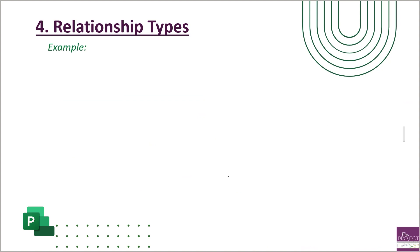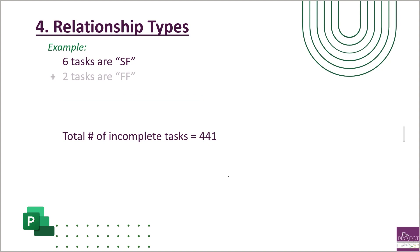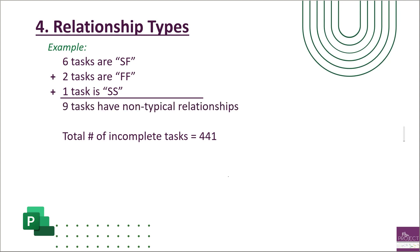Here's an example of how to calculate this. Go through the project and count how many tasks have non-typical relationships. In this example, we have 441 incomplete tasks total: six have a start-to-finish relationship, two have a finish-to-finish relationship, and one has a start-to-start relationship — nine total non-typical relationships. Divide nine by 441, which gives us 2% — well within the 10% margin DCMA allows.